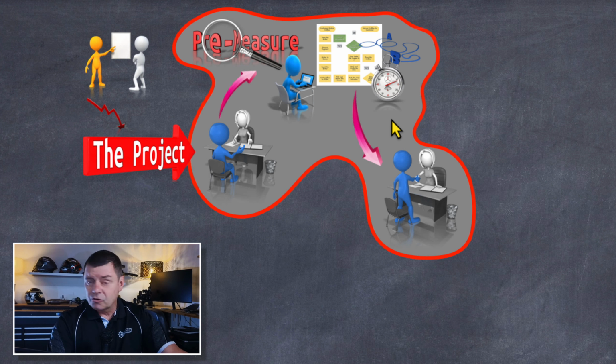They might do some sort of constraint analysis, because the project, if it has a lean bias, is going to be focused on cycle time or inventory or throughput or something like that. So some sort of constraint analysis, whether it be time or throughput volumes, would take place in there. There would be other pre-measured data that you would have collected, you would put up on the screen or whatever the case may be. It might be numerical or quantitative data, but it could also be movement data or spaghetti diagrams and things like that.